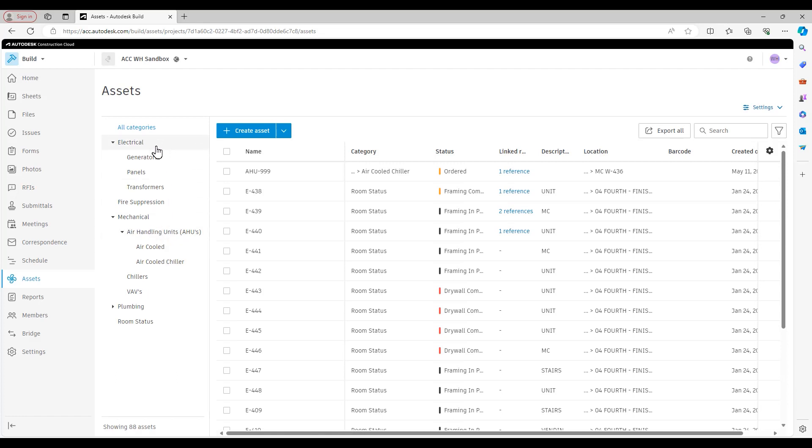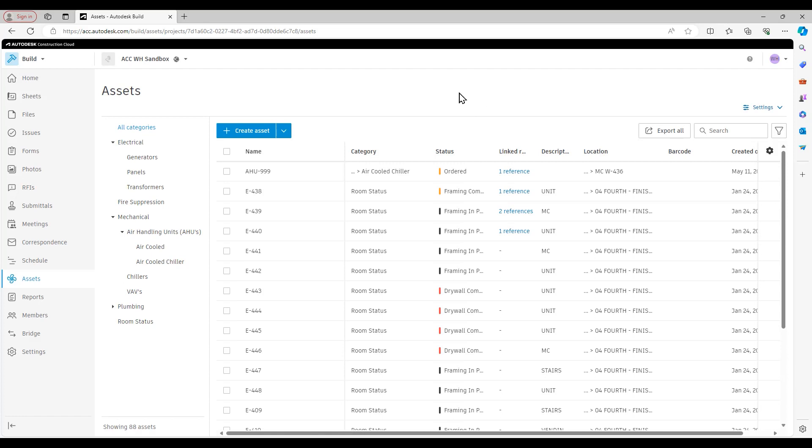The reason I've set it up this way is because back when I was in industry as a project engineer, I did a lot of mission critical work. That's also one of the primary use cases you will see for the assets toolset is procurement tracking of MEP equipment. And when I say procurement tracking, what I mean is tracking a total of 21 different steps. So theoretically, you could track a piece of equipment all the way from the manufacturer's submittal through level five commissioning. It just depends on how you set up the asset status sets, which we will talk about in a future video. But for now, just know your categories are going to appear here on the left.